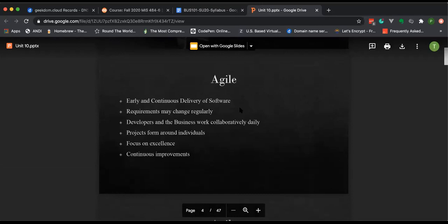What that means is you start planning at the beginning of the first week, you work the first week, you work the second week, you wrap up at the end of the second week. You do a retrospective of what you completed, what went well, what didn't go well, what you would change, and then you go back to planning for the next cycle. This is really a great model for when things are going to change regularly.